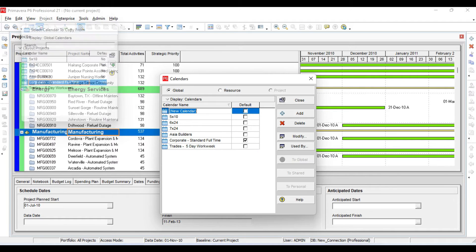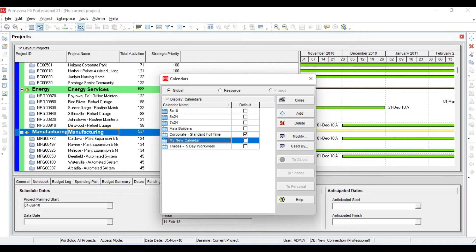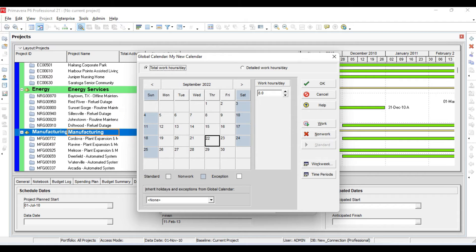I want to make a new calendar. I will name it 'My New Calendar'. By checking this default box, any new project you define will automatically take this calendar. I will modify this calendar according to my needs. This standard calendar is currently set to five days per week and eight hours per day.